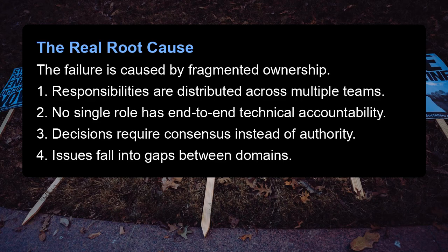The real root cause: the failure is caused by fragmented ownership. 1. Responsibilities are distributed across multiple teams. 2. No single role has end-to-end technical accountability. 3. Decisions require consensus instead of authority. 4. Issues fall into gaps between domains.